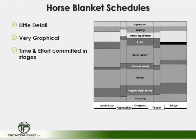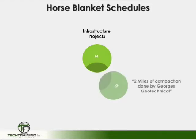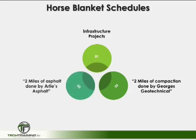A schedule system that may show even less detail is called the horse blanket scheduling system. It is very graphical and shows relative levels of effort or time committed to particular stages of the project as it evolves. A good example is an infrastructure project where two miles of roadway contracted to a particular contractor is listed simply as two miles of roadway done by G.C. Jones. This type of schedule lets the CM know which contractor will be completing which work and how much time they have to do it.